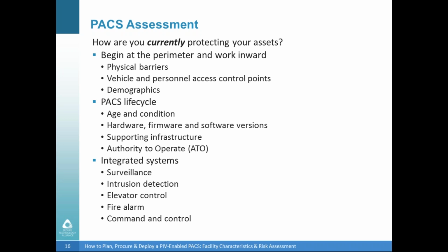You also need to look at the condition of the supporting infrastructure to determine if any upgrades will be required as part of or in conjunction with your project. You may need to coordinate with facility management or engineering personnel regarding space, power, or HVAC requirements, and with information technology personnel regarding network communication or cybersecurity. Adding these skill sets to your project team early on will limit the surprises and improve the odds of success.